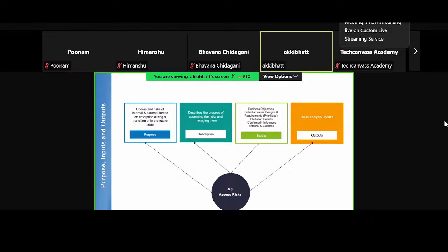Especially working in a government domain, some projects went on hold all of a sudden because there's not much budget for this project right now, so it has to pause. This other project has to start. So they have limited budgets, and if these constraints are not considered early, the initiatives may stall, or may fail to deliver the value that was expected on day one of the initiative.